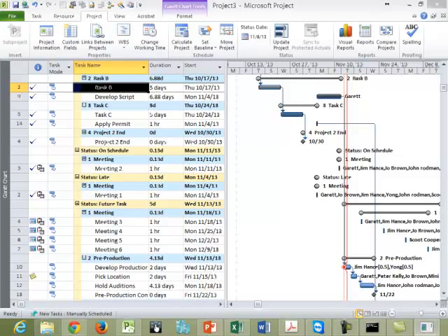System time. Yes. If you don't change the system time, then you don't see the progress line progressing. Alright. So when there is a progress line, you will know which one is late, which one is early, or which one is delayed, which one is on time. Okay. So this progress line will guide you where you are. Each time when you change the date, this thing will update automatically. Move forward. Okay, this one you need to change the system time.